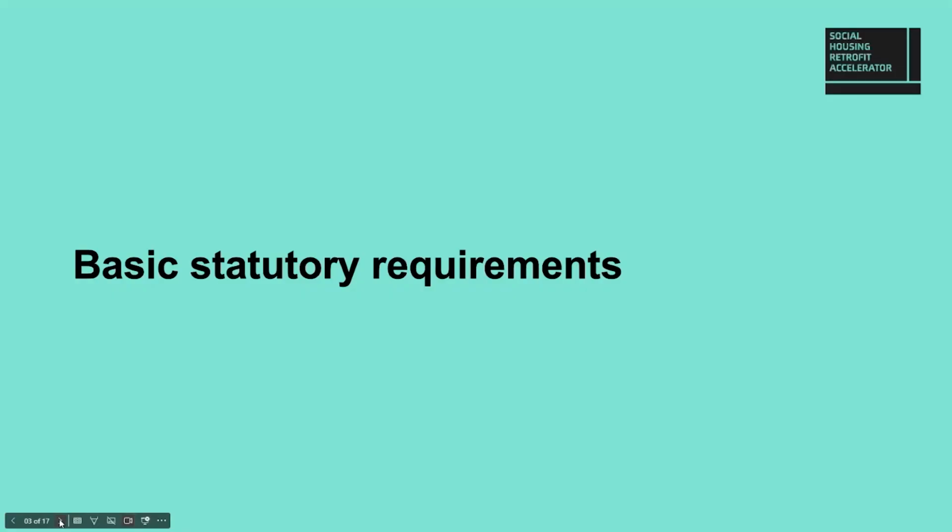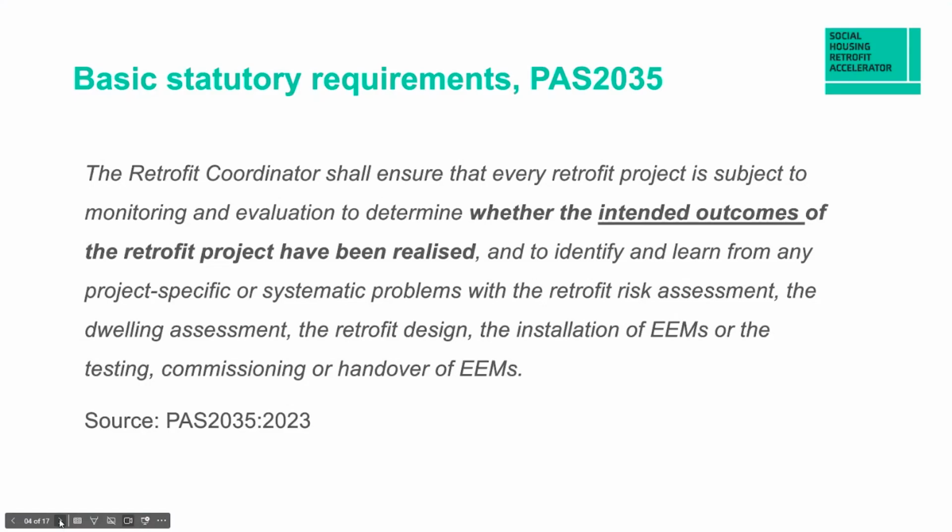So, basic statutory requirements. You have to comply with the PAS 2035 under a government-funded retrofit programme. As we move forward now, well, it'll be from next year, there's a process of transition underway, transitioning from PAS 2035 2019 to PAS 2035 2023. And you'll need to transition to using the 2023 approach by the beginning of April next year. But within the PAS is this